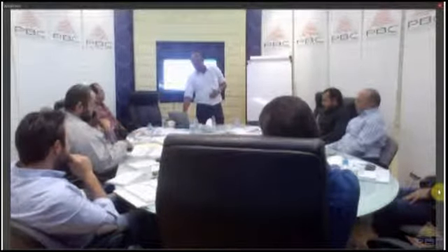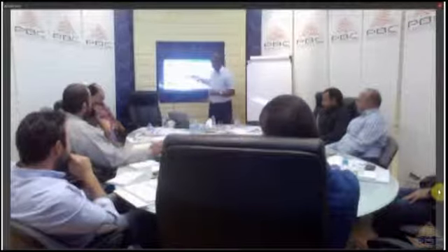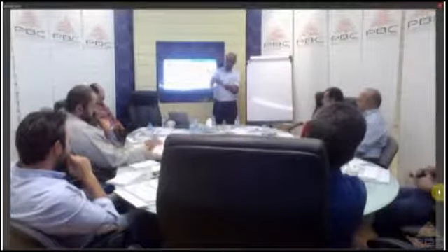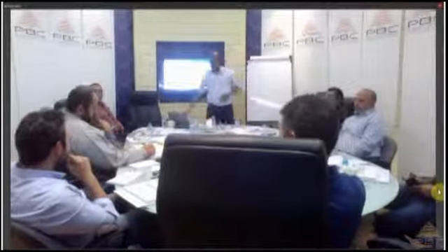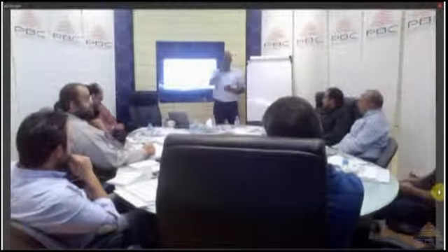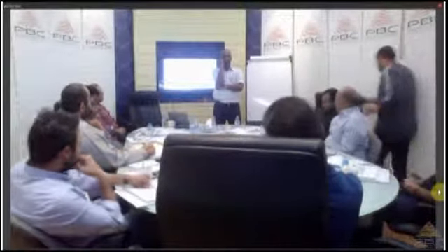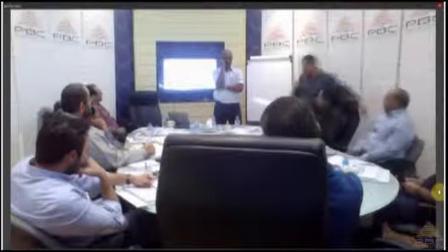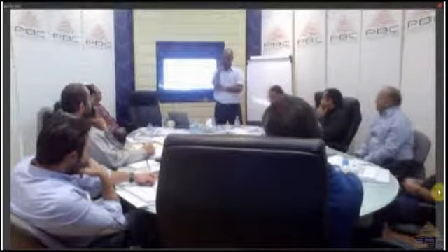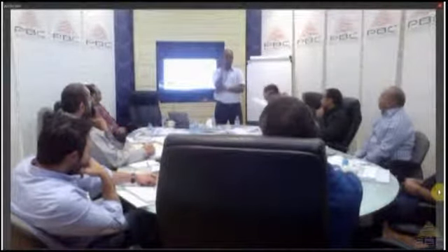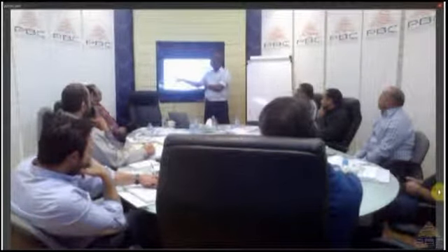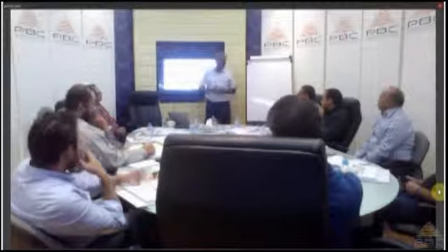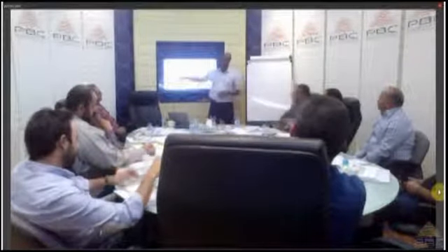Okay. Now, we mentioned before the cost of quality when we were talking about cost, and we said this is an extra component when it comes to cost. We have different types of cost of quality. If I'm thinking about my product and I need to spend money on the quality of a product or a service, I have 3 options. I can either spend in prevention or appraisal or failure. While failure is not an option, we know why.